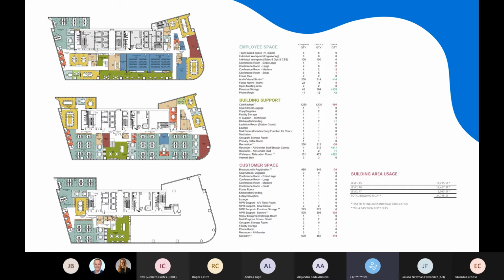Okay, so what's their timeline for pouring these slabs? They're like a week of floor. Okay, so when are they pouring? I don't know the exact date, but September 7th was the date that they needed to have information so that they could go back to their engineers and relook at that specific slab to see how the PT cables would have to be run. So we don't have to have the structural designs for September 7. All we have to have is basically the cutout of the slab. Precisely. Okay, that seems feasible.